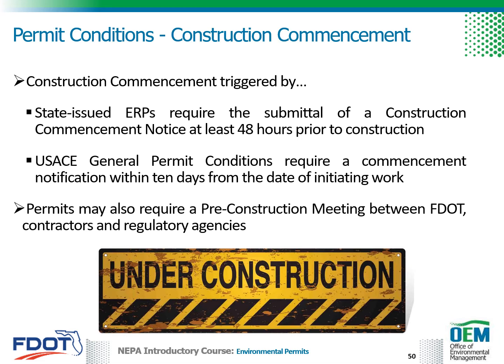Note that some permits also require a pre-construction meeting between FDOT contractors and regulatory agencies to review permit conditions and ensure a clear understanding of the permit requirements by all parties.